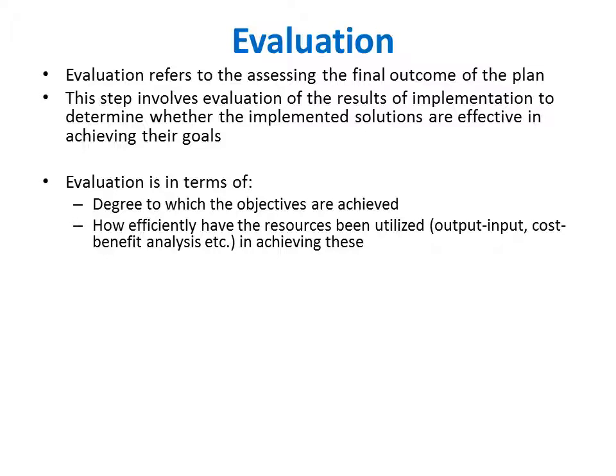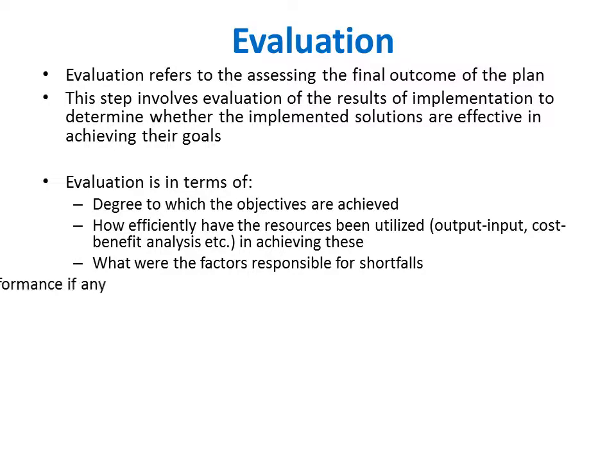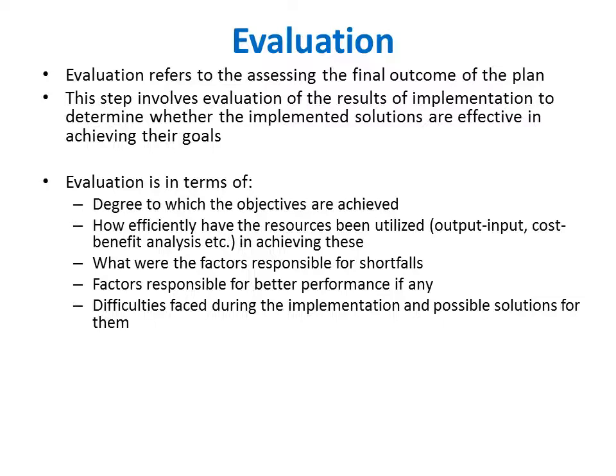If there have been any shortfalls, that has to be reported, and the factors that were responsible for the shortfalls have to be assessed. Similarly, any better performance, better than expected, and the factors which led to this better performance have to be studied. Difficulties faced during the implementation and possible solutions for these, lessons learned, etc. form a part of the evaluation.